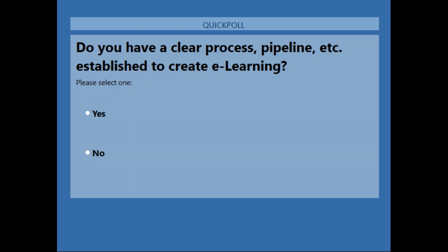But it needs to be something that you plan out before, as you reach whatever agreement it is with your own team on a corporate level or with your clients in a one-person shop. That needs to be agreed upon. What happens if there are re-edits? What happens if the schedule goes beyond? That's not ever an easy topic to broach, but it needs to be broached.